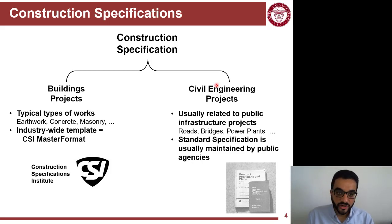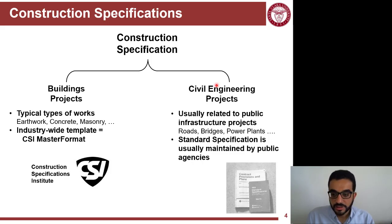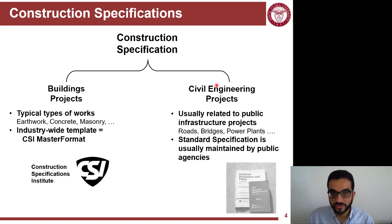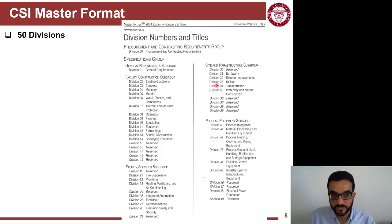Civil agencies might follow a national guideline or entity — for example, the Department of Transportation might follow the guidance of the Federal Highway Administration. So depending on the project type, buildings versus civil, you will have different representations and organization of specifications. For this course, we'll focus on the most standard one: building projects following the CSI Master Format.